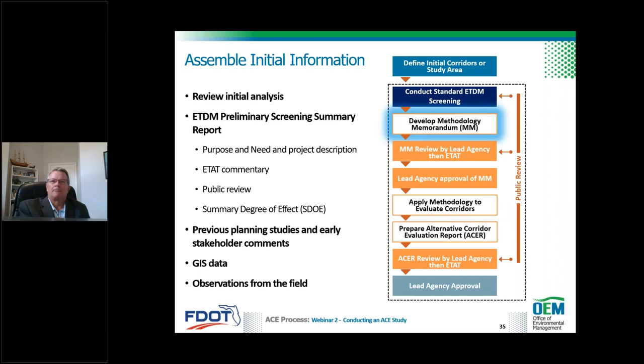Okay, so the first thing we do, of course, is conduct an initial preliminary screening through ETAT. This is before your methodology memorandum. This is to get your initial stakeholder comments and comments from the ETAT on the project itself, things to be aware of. So as we're preparing for the methodology memorandum, the first thing we want to do is just review the initial work that we did prior to even sending out that first screening to the ETAT. So you will have gathered some data there. There might be some updates, of course, from the ETAT team and other stakeholders or the public that are coming in.